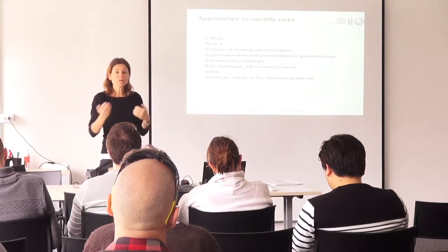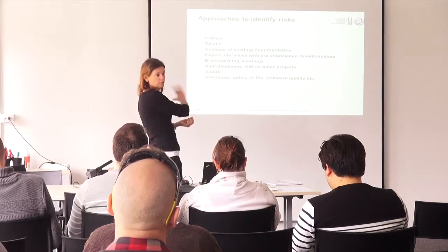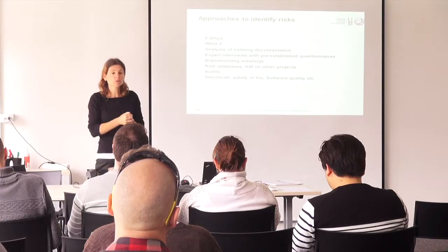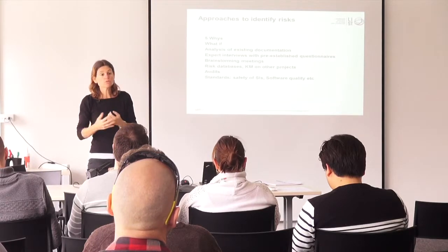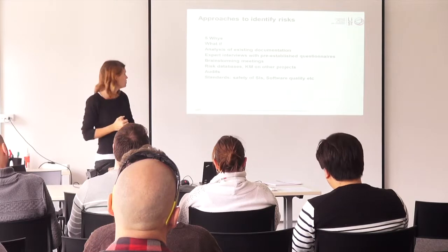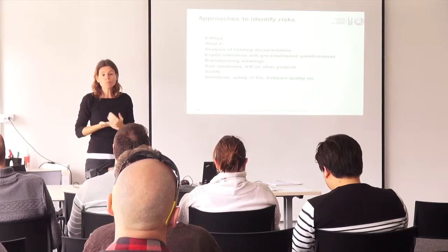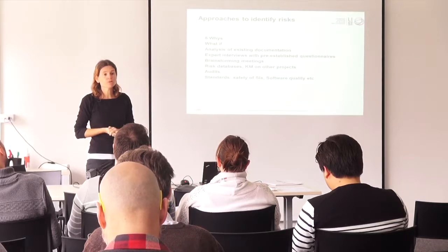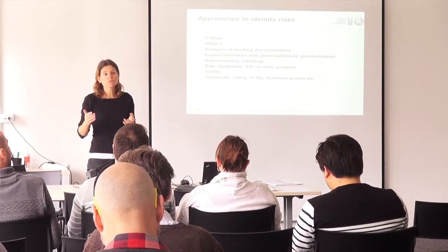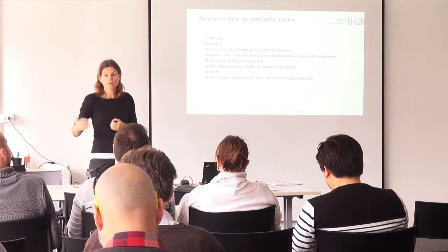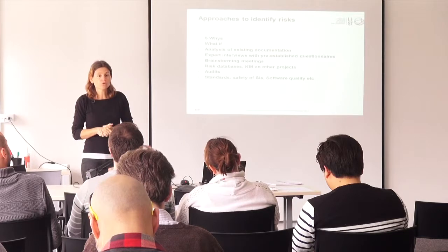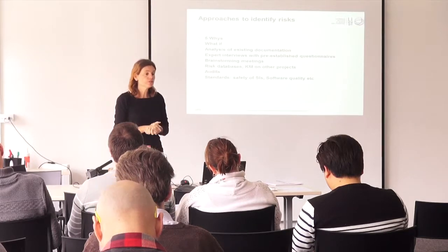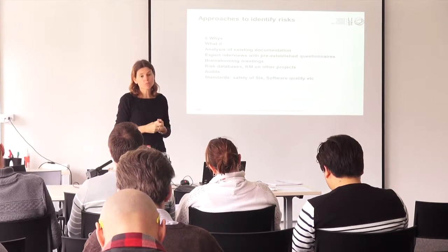If you can go back to past projects, have a look at that final project document, the final report on your project, and if there is a paragraph listing the risks, you can use that as a source to try to identify new risks. If you have a PMO, a project management office in your organization, and they gather some risk feedback on the project, it's also a good way of discussing them with them at the beginning of the project.